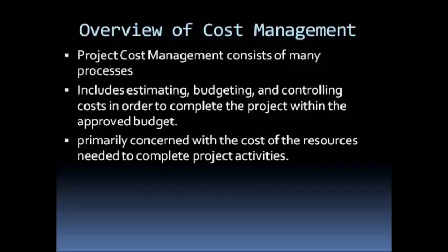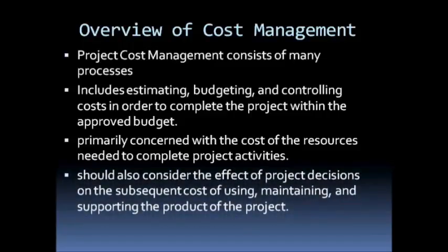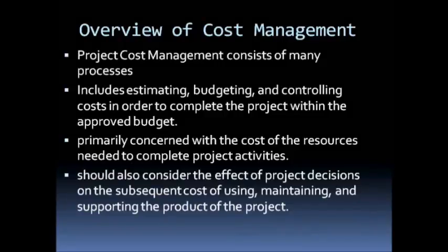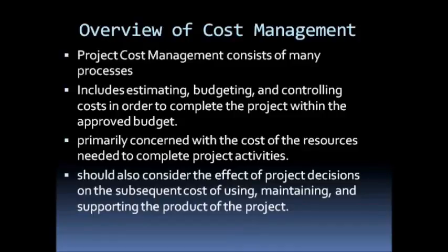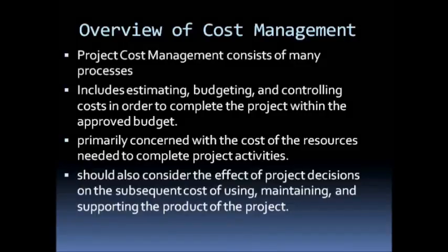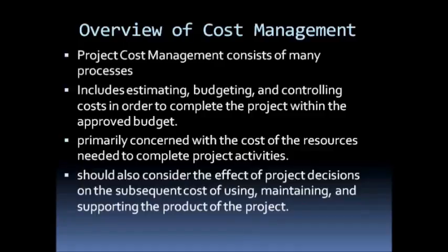Cost management is primarily concerned with the cost of the resources that will be used on the project. But it is important that we always consider the effect of decisions regarding cost on the subsequent costs of maintaining or operating the product of our project. For instance, if we decide to use cheap materials to create a certain product, it might increase the cost of maintenance later on if the product has been turned over to operations.